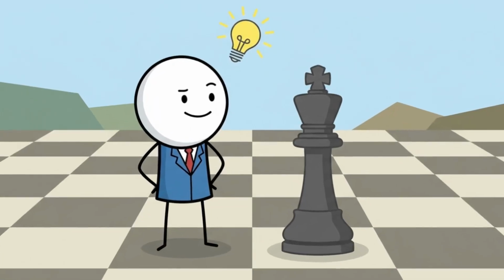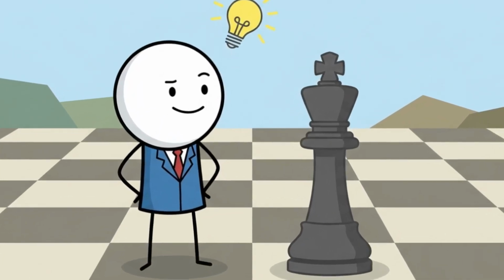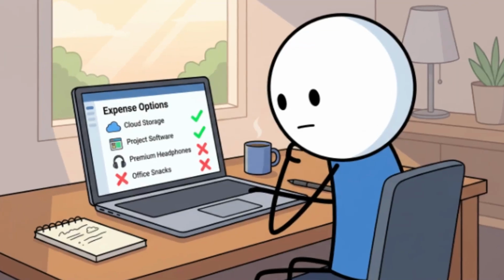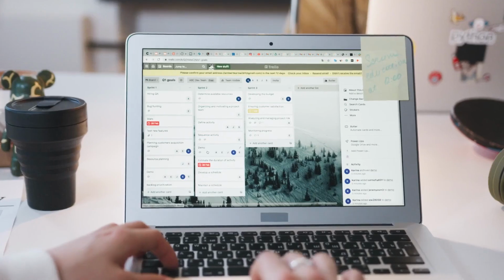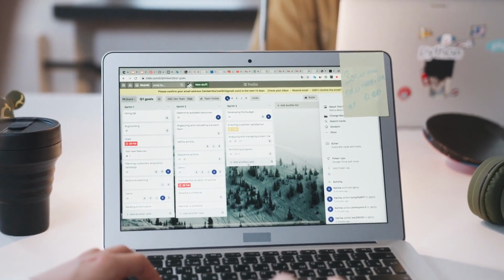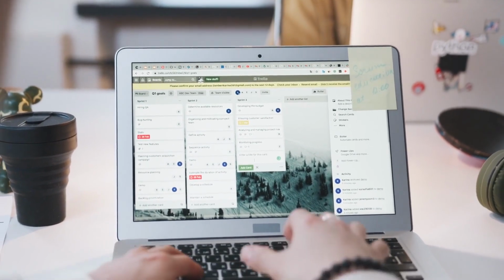A practical setup looks like this. Create one workspace. Make each client a project. Break the project into phases like demolition, framing, and finishing. Then assign deadlines. That gives you a lightweight construction workflow without paying.